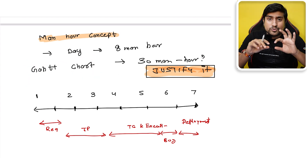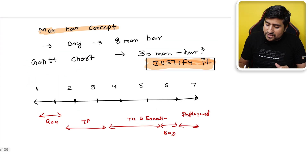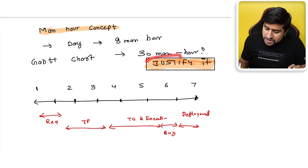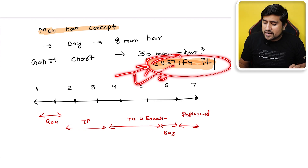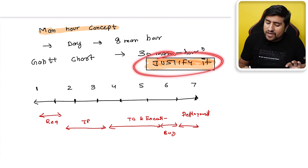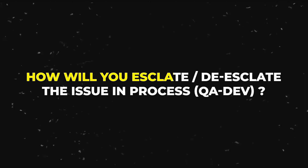This is called a Gantt chart — make sure you read about how to give estimates on a timeline basis. You have to justify your answer: how many resources it will take and what the man-hours are. That is how you give a proper estimate for a project.